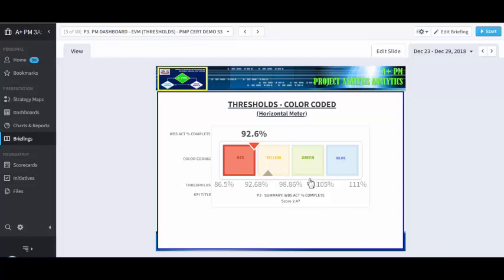Remember, you're dealing with a specific time frame, because it's scaled against planned value. Planned value is no more than an increment in time to the budget. So we're looking at 98.86 to 105. Now you're managing your team properly. And for the company, that's what you're being paid to do: manage that team, manage that project in green status. But the high potential candidates are going to be striving towards that blue, which is going to be 105%